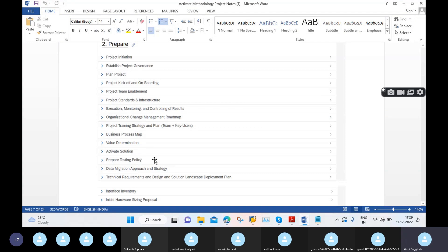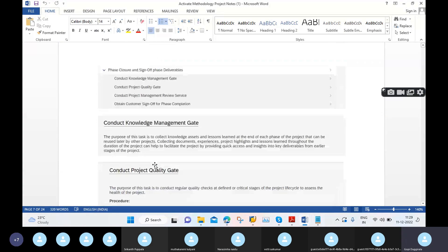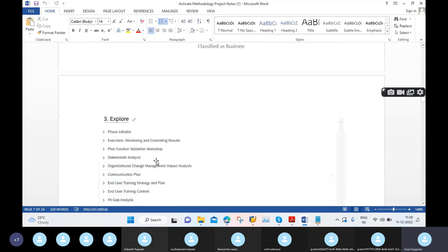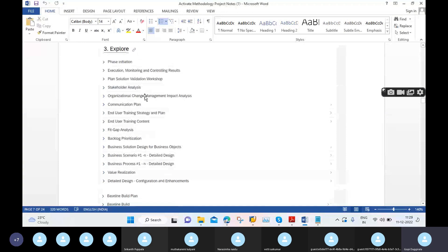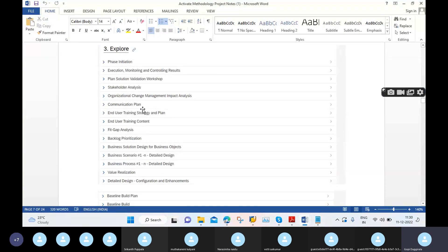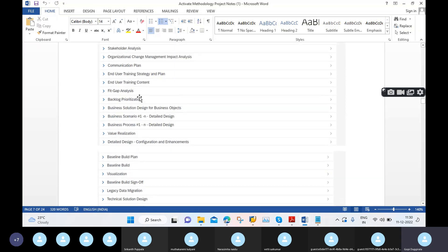We then moved to the Explore phase. The most important activity in the Explore phase is fit gap analysis, and we also need to conduct validation workshops. The build also starts here as a baseline build.